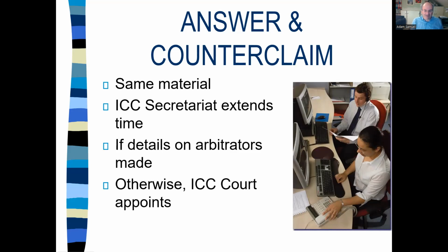An issue that came up in another institution was the situation where the parties had agreed on an arbitrator who insisted on being paid above the going rate for that institution's arbitration. The benefit to the institution of having an agreed-to sole arbitrator charging a higher rate, however, could have overridden their concerns about the fees, because it's a lot cheaper to go with one arbitrator that everyone agrees to, typically, than three, even if all three are charging a slightly lower rate. There can obviously be a reply to the counterclaim.